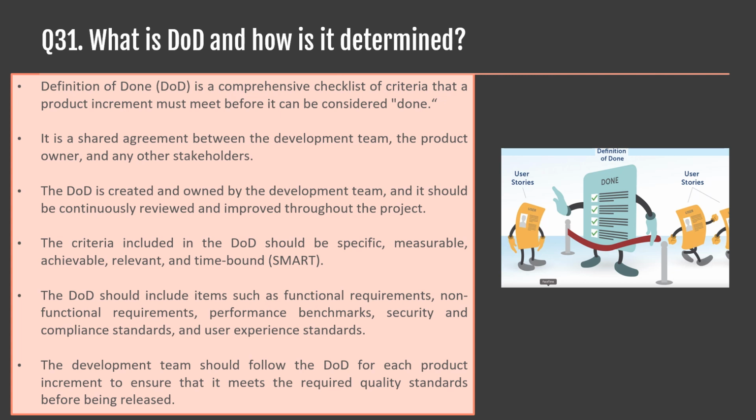The payment integration must be fully documented, including user manuals and technical documentation. Integration. The payment integration must be integrated into the existing system and not cause any conflicts or errors. Performance. The payment integration must meet the defined performance requirements such as response time and load testing.